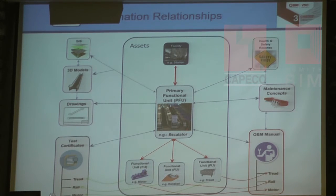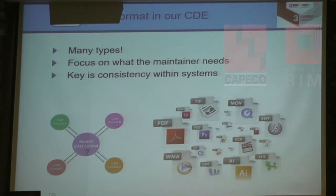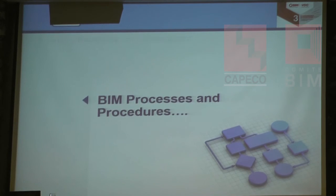Absolutely important there is that concept of relationships between different types of information, because the thing with Crossrail is the speed in the use of the CDE is the speed at which you can then pull out that data. You don't need to worry about what type of software you need to use. Just be prescriptive on file types. And that was really, really important, because you let the supply chain worry about interoperability. You just say you want particular file types as the product in information terms.